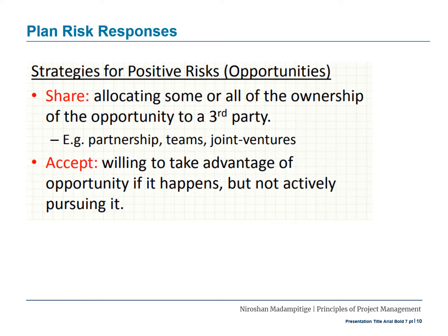Allocating some or all of the ownership of the opportunity to a third party is known as sharing the risks. Example, partnerships, teams, joint ventures. Accept. Willing to take advantage of the opportunity if it happens, but not actively pursuing it.